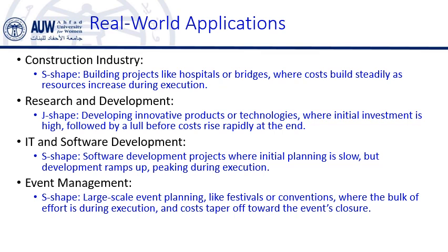This is where costs begin to rise steadily. Execution ramps up significantly as construction begins, leading to a peak in project cost and effort, which tapers off as the project nears completion. The final phase involves inspection, certifications, and handover, which require less effort and cost.